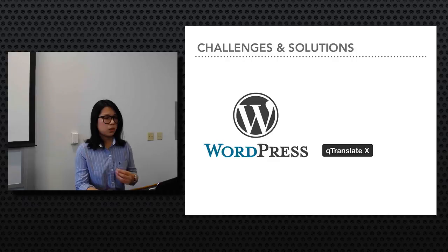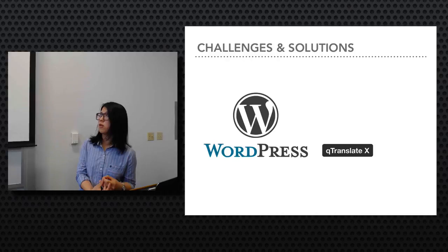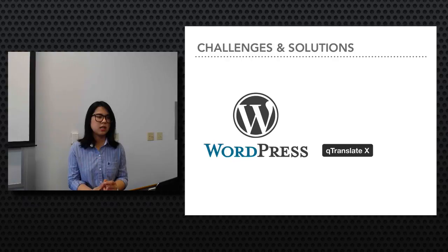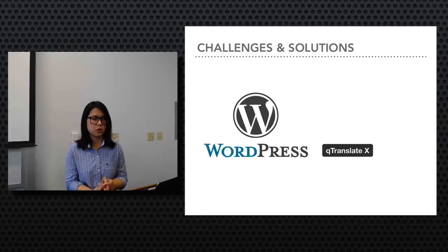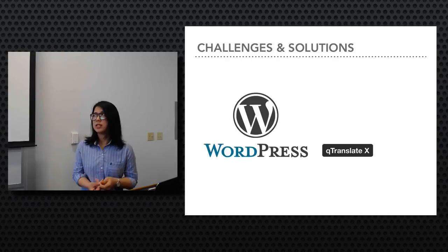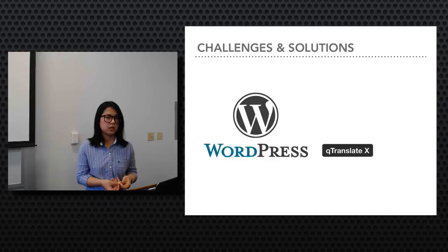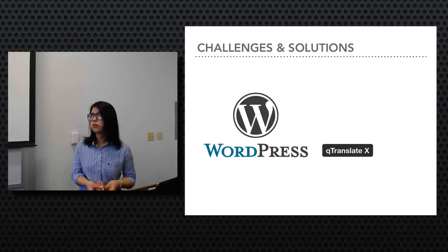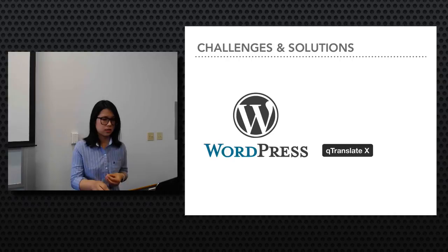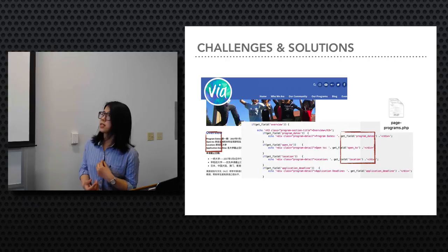We did get the admin account from our client, and they trusted us enough to let us modify the original website. This is both a blessing and a challenge, because although it's straightforward and efficient, I was really terrified when I was copying the sources for translation, because I was afraid I might break or delete something. So the solution for this challenge was that I used screenshots to capture the original website, and I kept documentation of the changes I made on their original website. Also, I did a mock build for each language for each web page, to make sure that the original website wasn't corrupted.